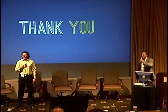Yeah, I think, for me as an architect, things have really... The question was that I mentioned some things about lean design principles, or utilizing lean in the design, procurement, and delivery of projects. It's been really interesting in the 7 years that I've been at Digital, because we've designed a process to design, procure, and deliver our data centers, and we're all familiar with standard schematic design, design development, et cetera. The message to folks is that whether it's a one-off project or a series of projects, you do well to spend a lot of time up front designing how you're going to design, procure, deliver, and commission your project. You don't necessarily need to follow all the traditional steps. We have something we call our gating process, and that works well for us.